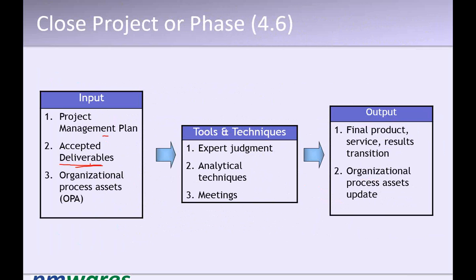In a big project, we have different phases. It can be divided into 3-4 phases. When a particular phase is over and we have met all the criteria, we go for closing that phase. Phase closure. Right. And at the end of the project, taking the entire learning and updating all the assets, we finally do the project closure at the end of all phases. If it is a single-phase project, then only the closure of the phase will occur. Right.